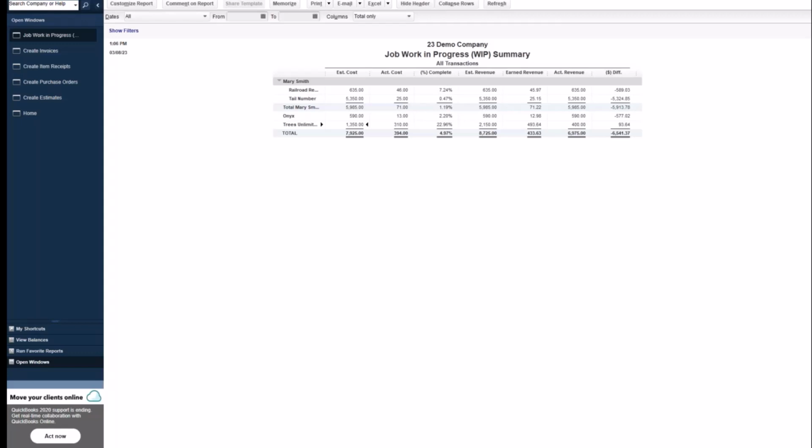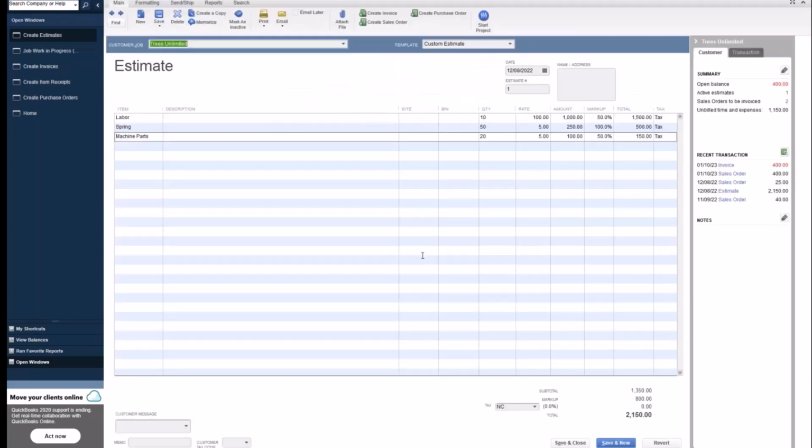Because about every 6 months, they go back to their estimate and they may adjust their estimate and put in a scope change, right? Especially nowadays, with the pricing of wood, pricing of metals, everything changes regularly. So if we come back and put in a scope change, some sort of change on this estimate, that is then going to adjust all of our percentage of completion, which will then flow into our over/under billing.